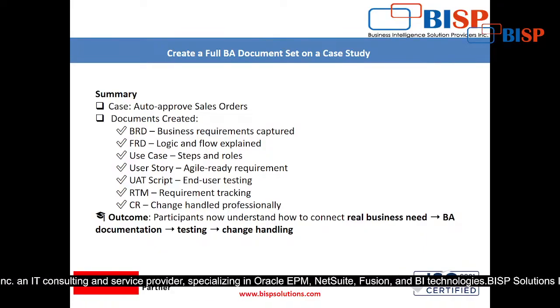So all in all, you will see here 1 2 3 4 5 6 7, right? 7 points are there, and at 2 days per document, that is 14. That means at least a minimum of 2 weeks of tasks is this.